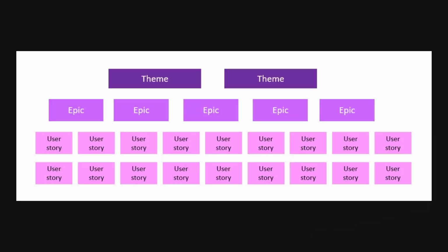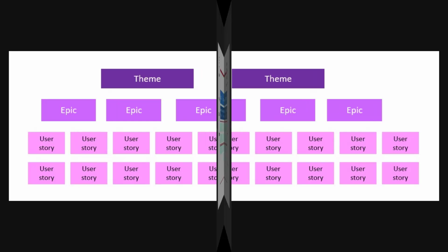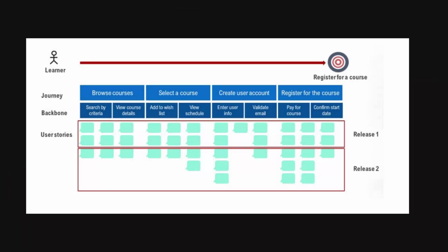So you're thinking, first of all, about ways of creating a hierarchy of your solution, your product. That could be done either through creating a hierarchy of epics, themes, and user stories. It could be achieved through creating a user story map or multiple user story maps, one for each separate user journey. You may be creating a product breakdown structure or feature tree. So there's more than one way to depict the structure of the solution.